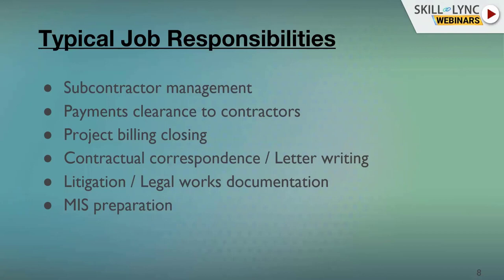Another thing is contractual correspondence and letter writing. In a project, there will be contractual correspondence between developers, consultants, contractors. That correspondence has to be as per contracts, and the project costing is basically considered during the letter writing, and specific figures, specific cost escalation, liquidated damages have to be stated clearly.